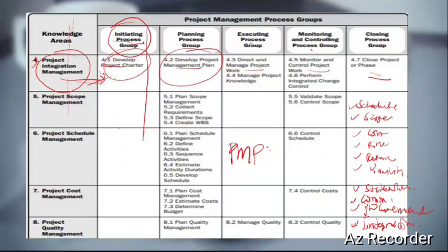All right. And the project management plan holds other information. It will even talk about the project life cycle, the life of the project, how it will go through the whole journey. What are the key stages in there? That's the life cycle of the project, and it is also stated in the project management plan. It will also talk about the development approach. How are we going to develop our deliverables? What approach are we going to use? Is it predictive? Is it iterative? Are we going to do it incrementally? We'll talk about this more. All these will be stated in the plan.